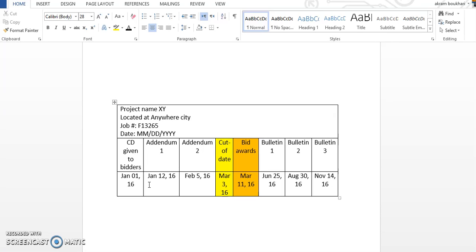So any changes given between those two periods, whether it is specification changes or drawing changes, it's called addendum. It may be one, two, three addendum, as much as they want. In this period, if the contractor submitted a claim, he has no right to submit any claim. No claim based on addendum. Otherwise, he should have considered price changing during estimation or bid price.